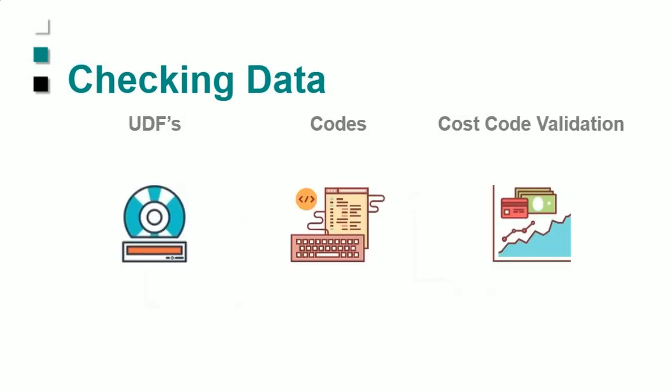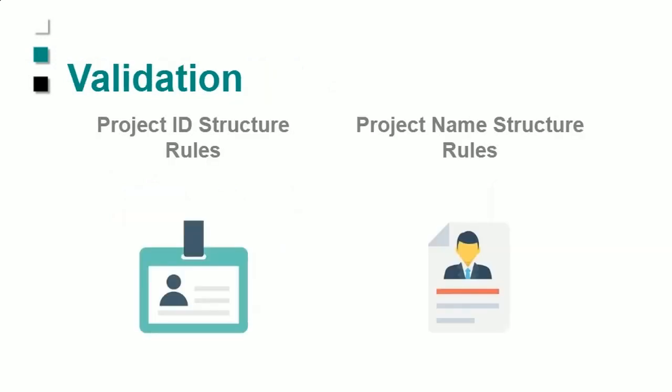And then we check things that are shared. There's lots of global data inside of P6 that's shared across projects. We let you deal with that by continuing to share them or push them down to project level. Those data elements are user-defined fields, codes, cost accounts, and resources. Resources you can't push down, but we do look at resources, roles, etc. Sue will show you those in detail.